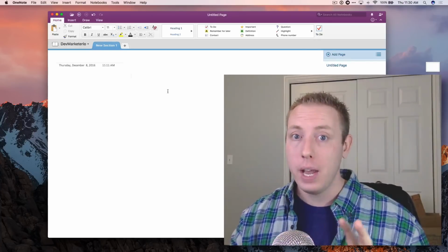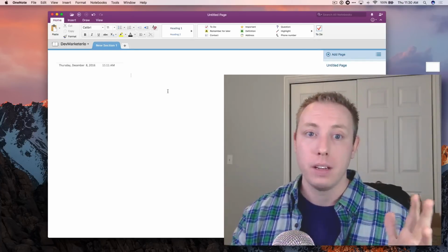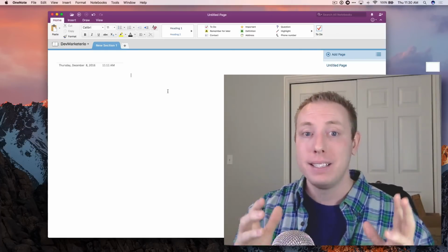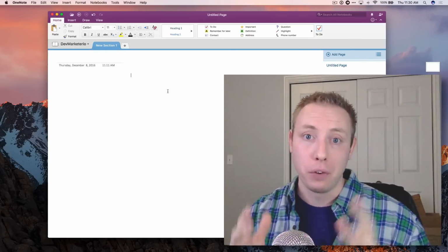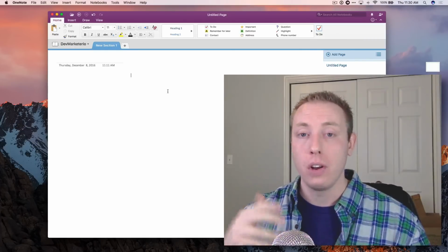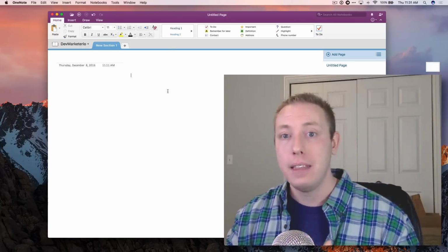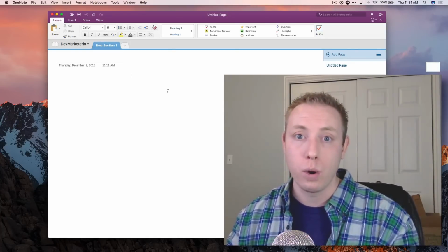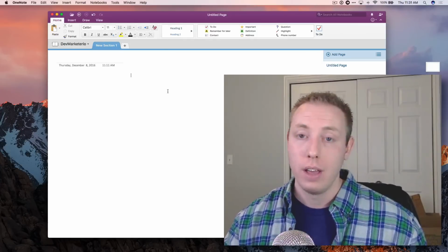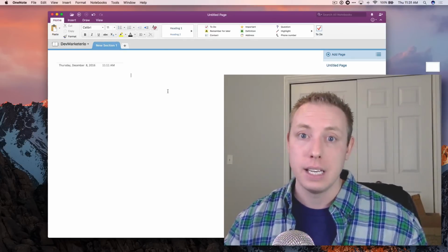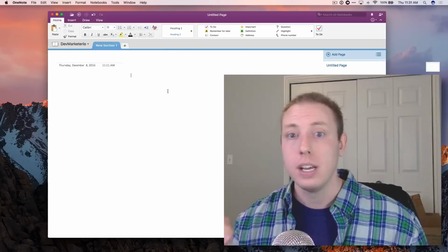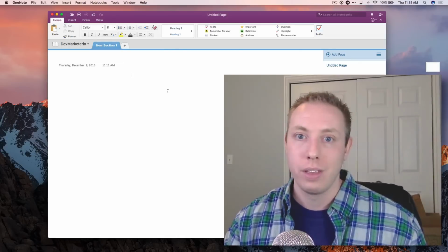Once we get that out of the way, then I'll do what I call a curated idea board, and that's basically my proposal for what we can accomplish based on all of those other factors. And then that usually goes into a scope of work, okay? And so then the scope of work is what actually gets approved. And that's basically the curated ideas. So that's saying these are the ideas that we have agreed to do, that I can accomplish. These are the time frames and so forth.